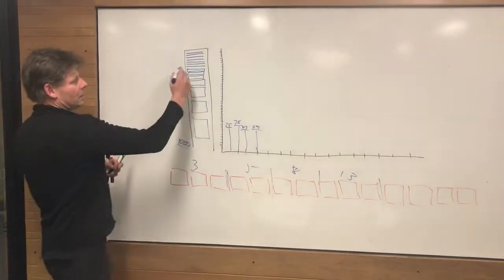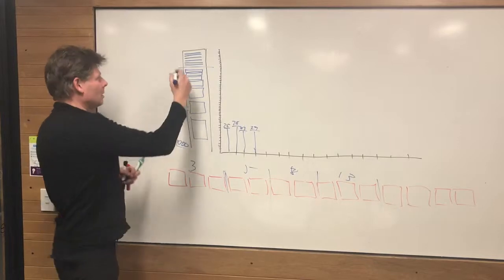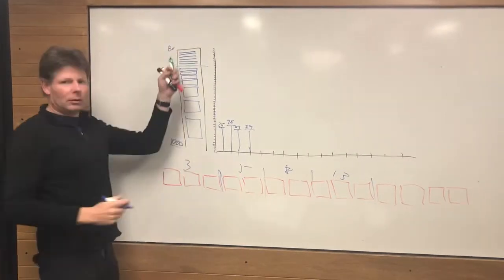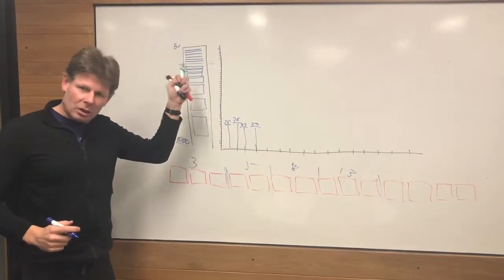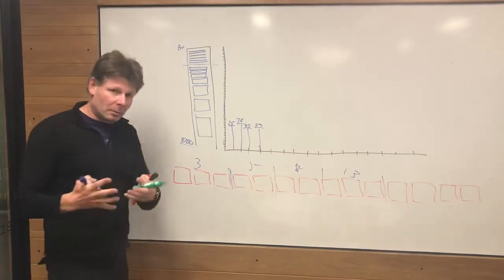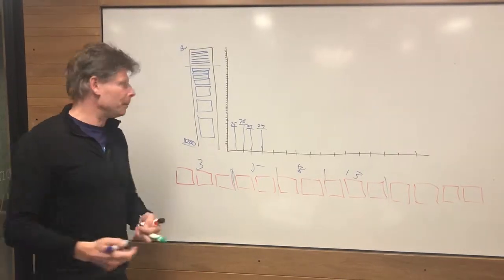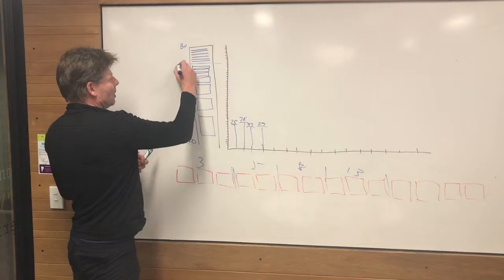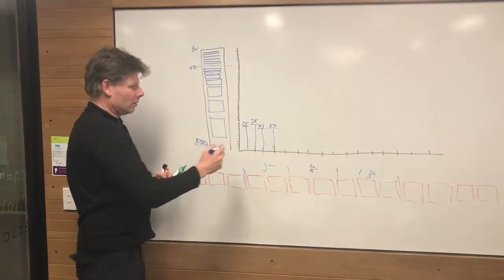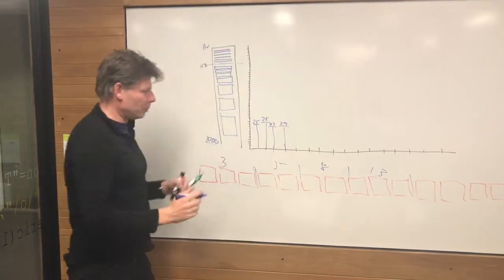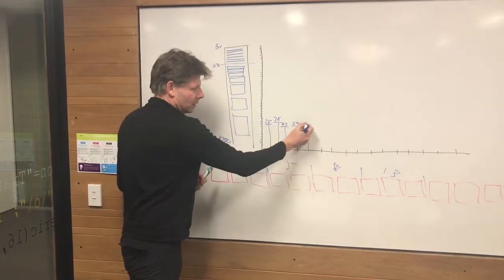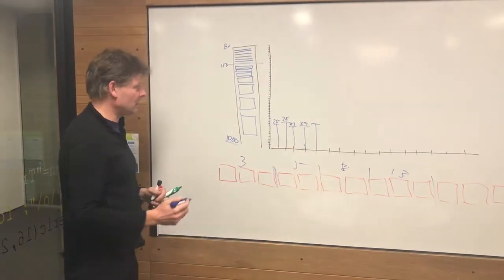Of course, by this time, we'd done quite a few. And these were the highest business value. These were the things that we'd refined and we knew that we needed to do. But of course, the business wanted to know when we were going to deliver. By this time, we'd done about 150 points. So if you add all of these numbers up, I think it came to around about 150 by sprint 5 when we did this affinity estimating.